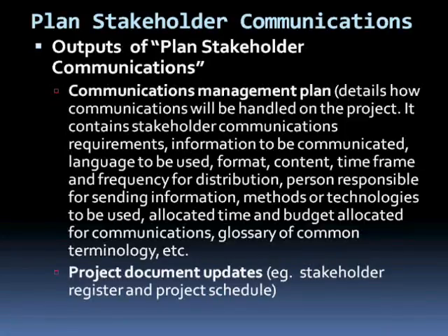It contains stakeholder communications requirements, information to be communicated, language to be used, format, content, time frame, and frequency for distribution of information, the persons responsible for sending information, methods or technologies to be used, allocated time and budget allocated for communications, glossary of common terminology, and any other useful information that needs to be updated in the communications management plan.